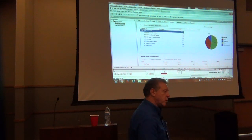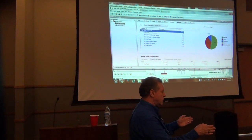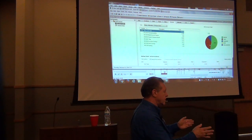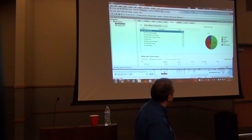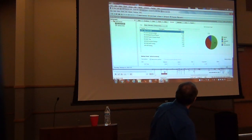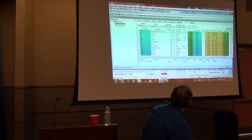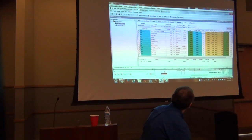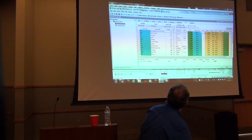If you don't know and you are using self-performed hourly labor, you need to find out. Because whether you use QuickBid or not, having a standardized national ratio of labor to material is something you want to use as a guideline, because right now I'm upside down. Knowing what I know, and I believe this is a reliable source, so where is the mistake? It's either here in production, I'm running too hot, and that's probably one of them right there.